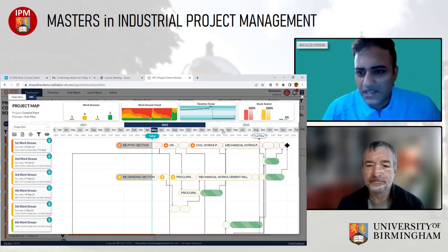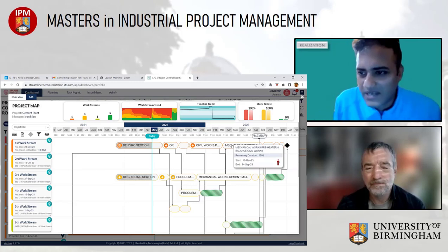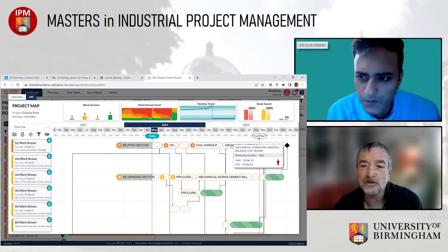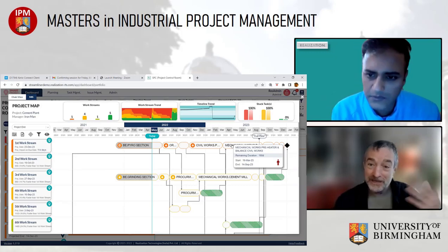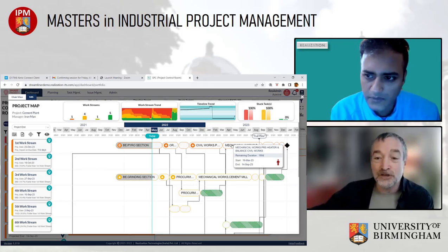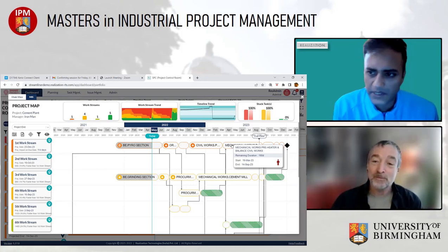So I have time till April or mid-March to make this happen, to mobilize these additional teams, get the contracts out, etc. And I can really act here. So it allows me to plan out my actions in the future. So in terms of scheduling, you allow a rolling wave mindset. I assume that the details of your dots at tier 2 and tier 3 and tier 4 get put in as that becomes short term. You don't force people to put all that detail in 24 months in advance.